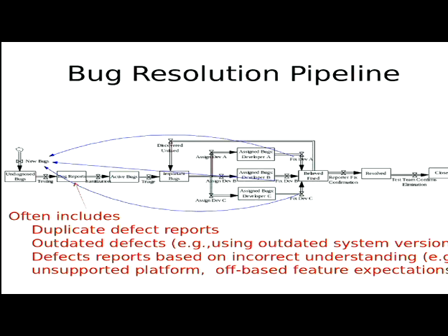Now, not all of those defects are going to be, in fact, fixed. Why not? Why not fix all defects? Some might be really integrated into your system and they're not actually that important. They might be mild in their implications, and fixing them might cause more bugs. It's a very real thing.